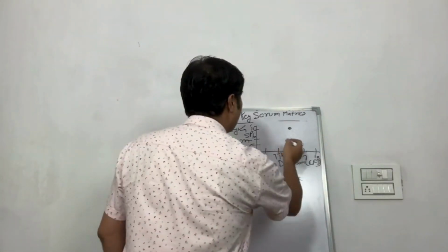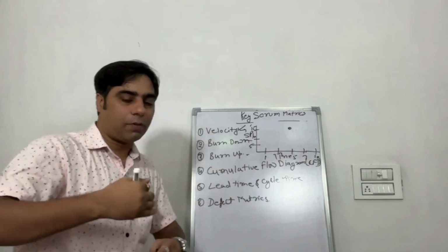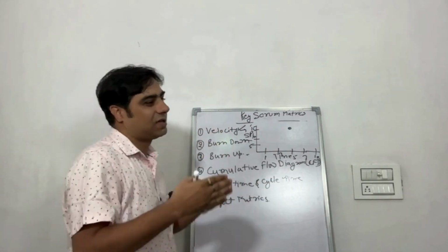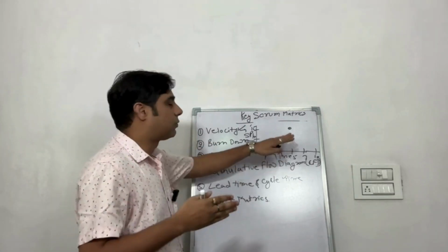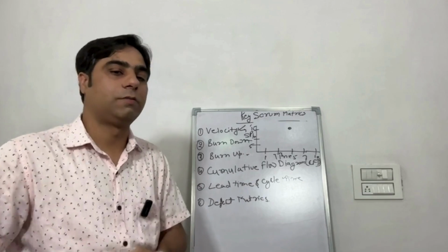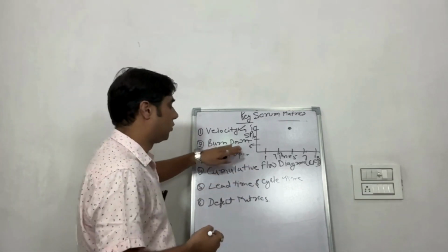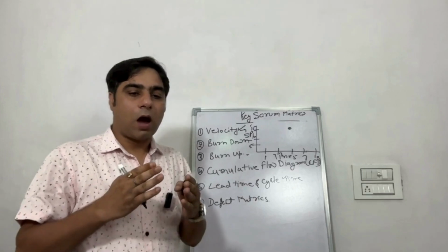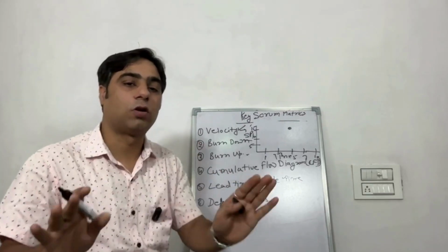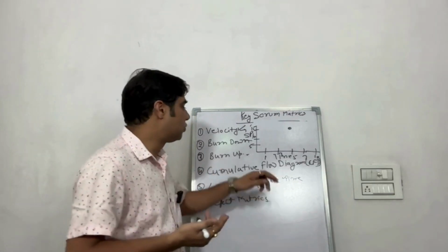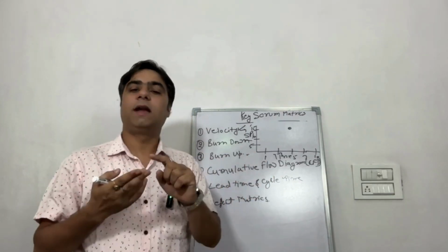So that is how you can definitely predict that, or you can say that every day you can analyze your sprint speed, how many points are remaining, how much time is remaining. So this is something like burndown. Burndown is how much work is remaining with respect to the time. That's all. And that is something we use to forecast for the release and the sprint.